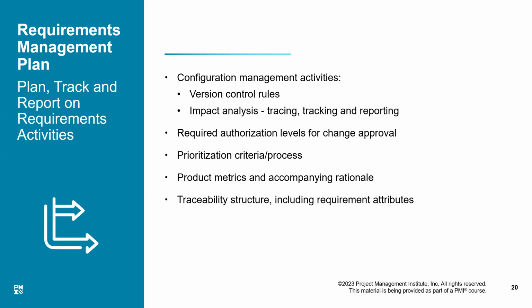So in the area of scope management, the project manager will create two kinds of plans. One is a requirement management plan and the other is the scope management plan. The requirement management plan is only concerned with collecting the requirements and recording them in a requirement traceability matrix.